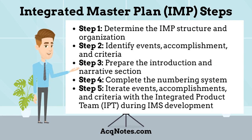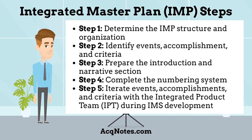The five steps in developing an Integrated Master Plan are: Step 1 — Determine the IMP structure and organization. Step 2 — Identify events, accomplishments, and criteria. Step 3 — Prepare the introduction and narrative section. Step 4 — Complete the numbering system.